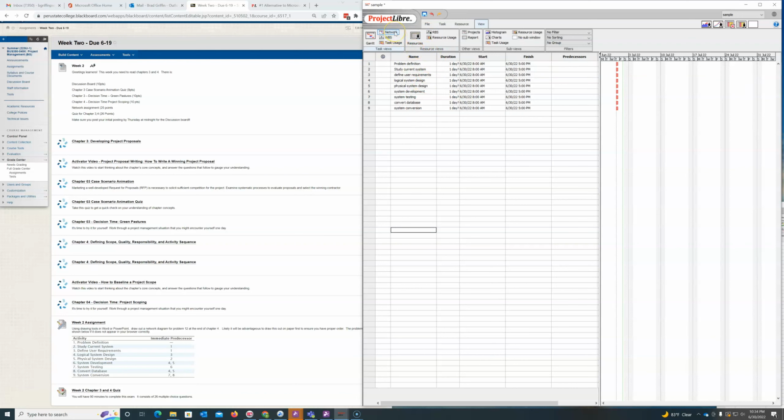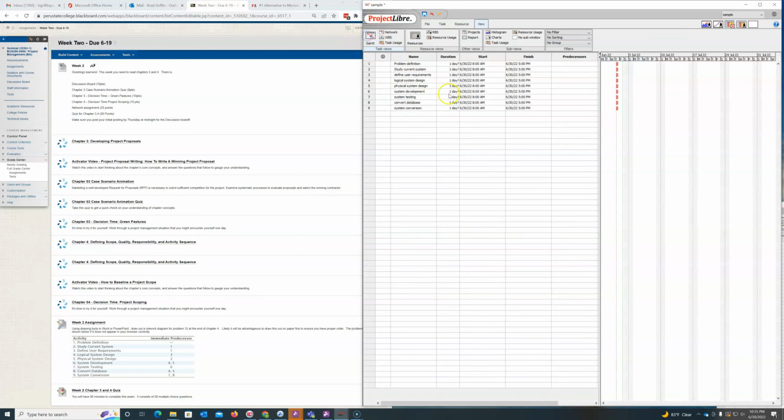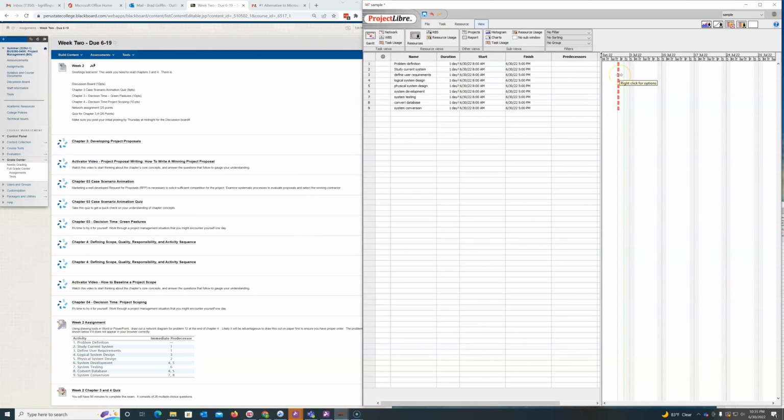And in fact, if we click up here, if we click View and then click Network, every task is assigned, but it's all here. None of them are attached to each other. So I want to go back and look at that main interface here where we start this Gantt. And in fact, if you scrolled across here, you'd see there's other things. We can put resources and predecessors. So I'm going to go through here and put some of the predecessors in here. And we can take a look at what happens to this in terms of overall project length.